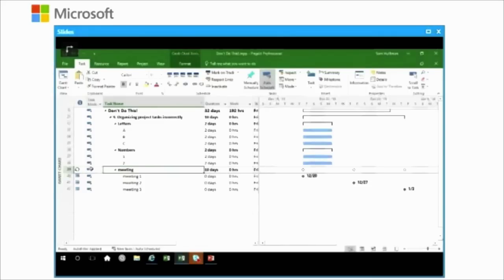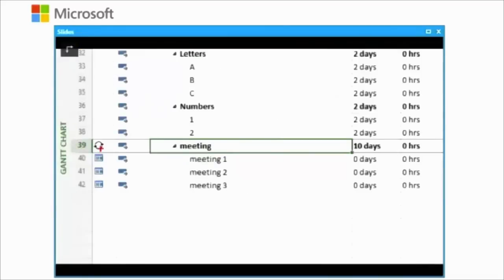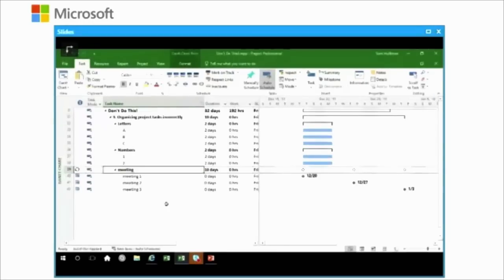I'm in auto mode, and in order to accomplish my auto mode, Project had to constrain the activities. Even though there are no resources attached to it, it will automatically try to be aggressive and schedule these in instantly. And in this case, because there's no sequencing, we'd just see three milestones on the same day. But because we're asking Project to calculate these and put them where they should go in the timeline, it had to constrain them. Now, the alternative to this